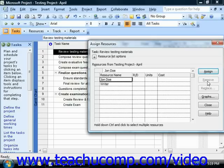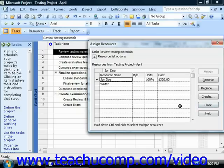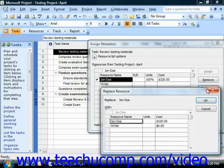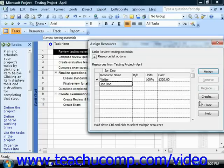If desired, you can also substitute one work resource for another by selecting the assigned work resource and then clicking the Replace button to open the Replace resource list. Here you can select the name of the substitution from the list and then click the OK button to substitute the resource. Note that substitution may change the units and cost shown, but not necessarily.